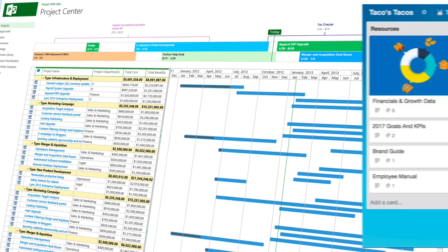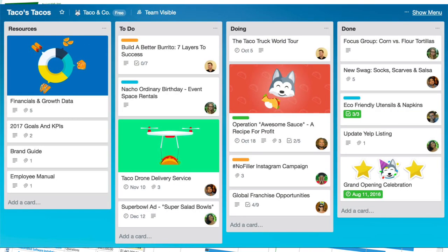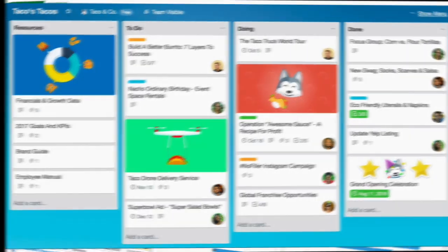Agile teams in particular use software such as Trello or other software that follows something called Kanban, where you have a backlog as well as what we have to do, what we're doing, and what we've completed, to keep everyone on the right schedule to ensure that we're getting the right things done.